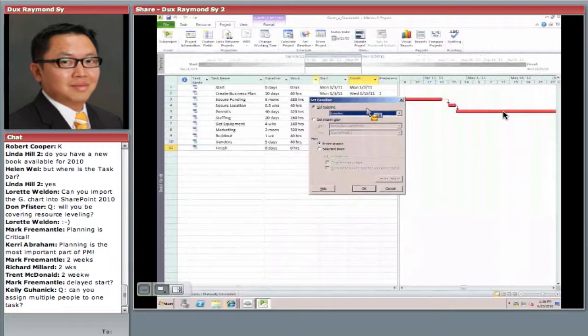If you're wondering why, imagine if you run a long-term project, and if you're like me, customers change their mind. 3 months down the road, if a change request comes in, the schedule has changed, I can take another picture, another baseline, so I can keep on doing that. So once the project is done, if you get questioned, how come it took this much longer or this much more money, I can bring back all the other baseline information and say, well, 3 months into it, we added 5 things. Or 5 months into it, we changed this resource. So you can save as many baselines as you want.